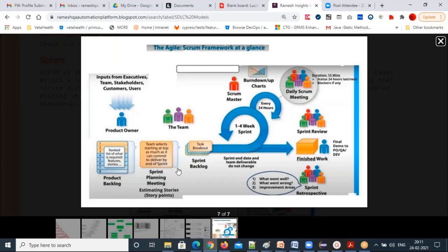You have to tell that clearly. So make all your tasks, right? Test case design, review of test cases, and then smoke testing, execution of test cases, then defect reporting, retesting, and regression testing. All these you have to consider. Based on how many days you need, you give the estimation. That's how the estimations will be done, and for each user story, the estimations will be given in the sprint plan meeting.